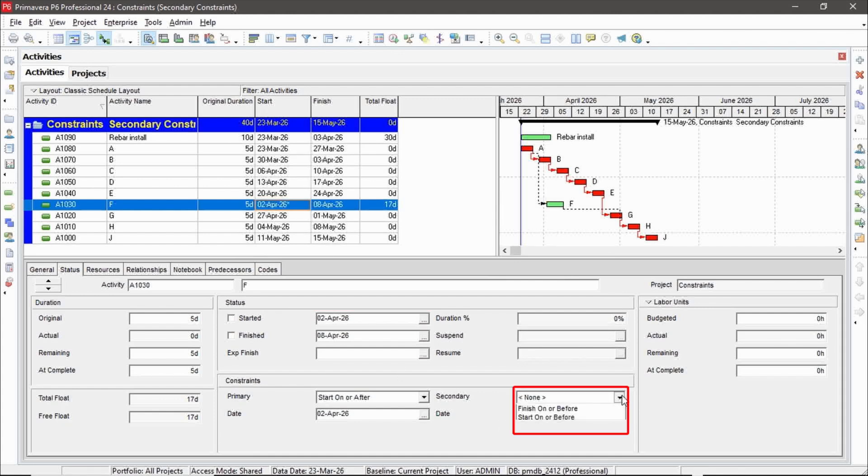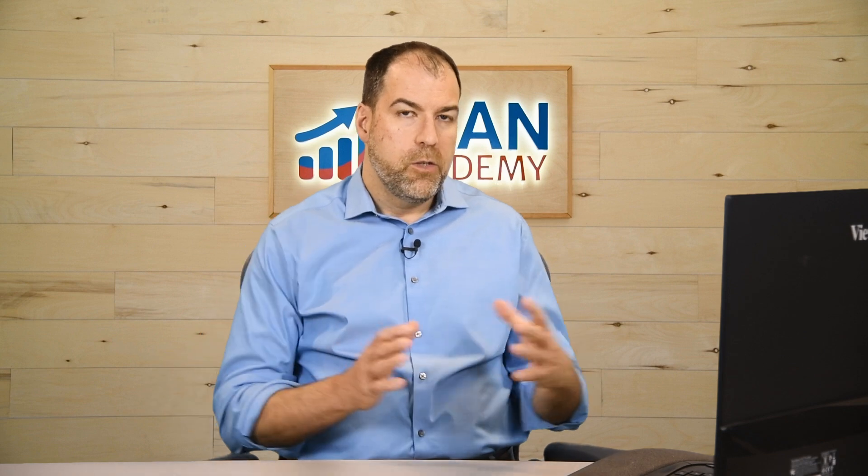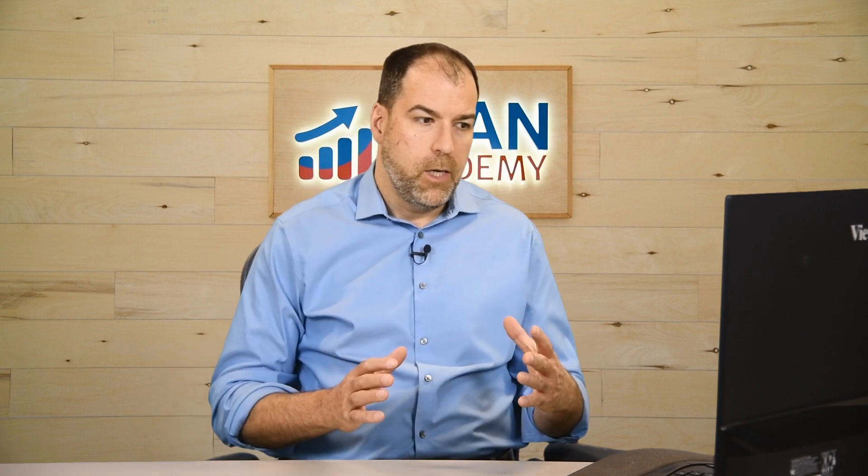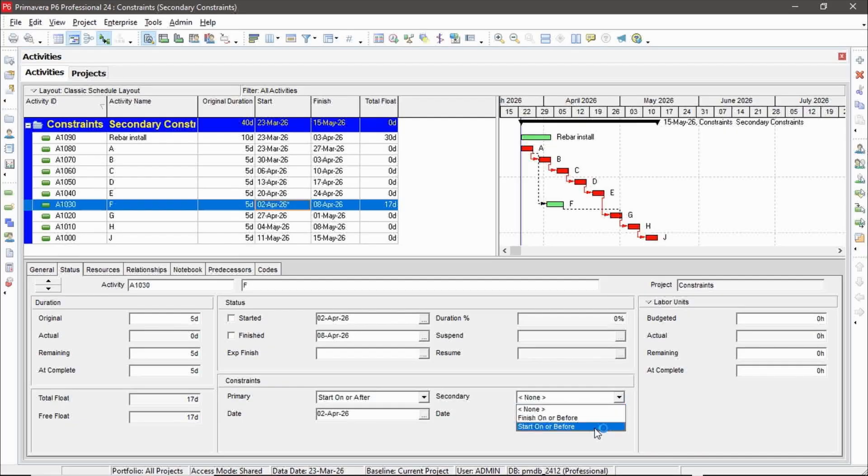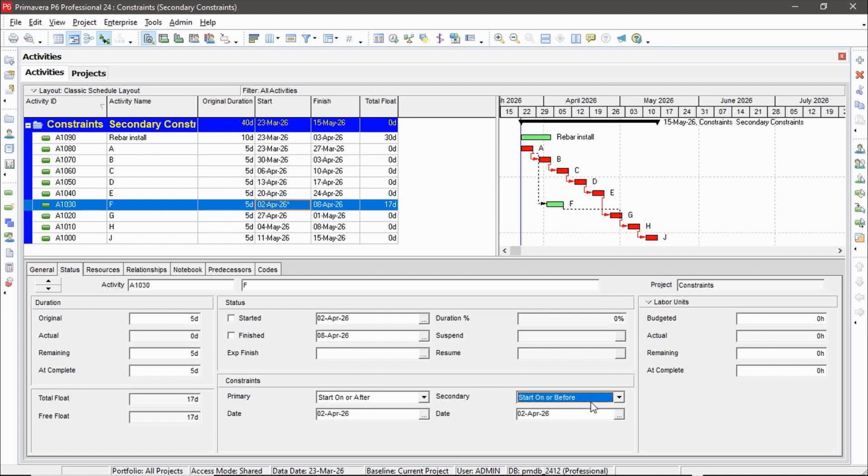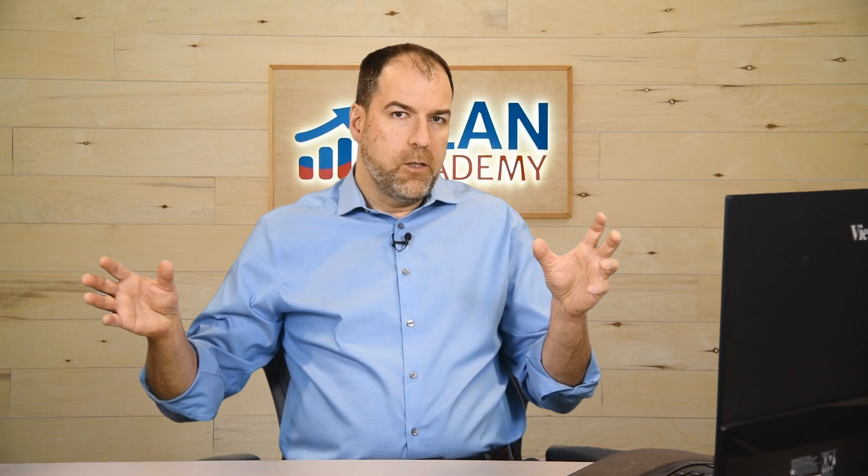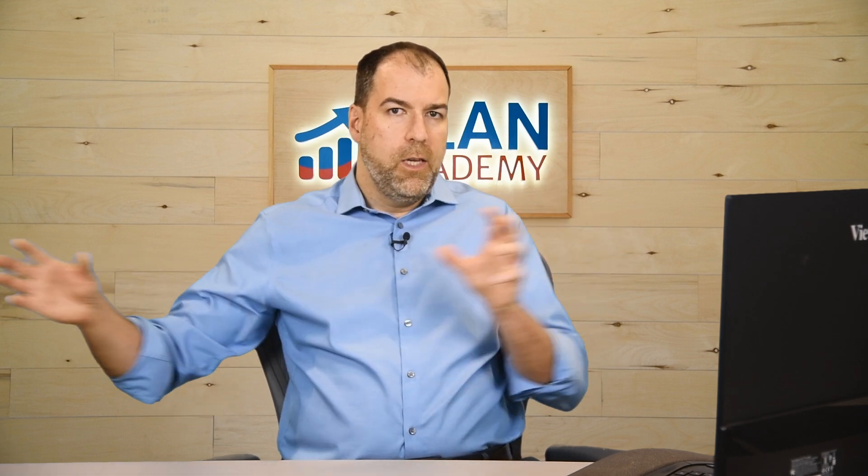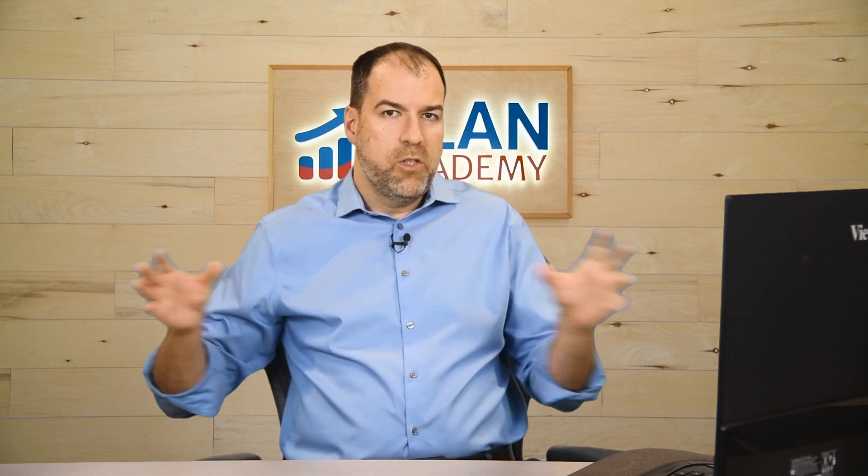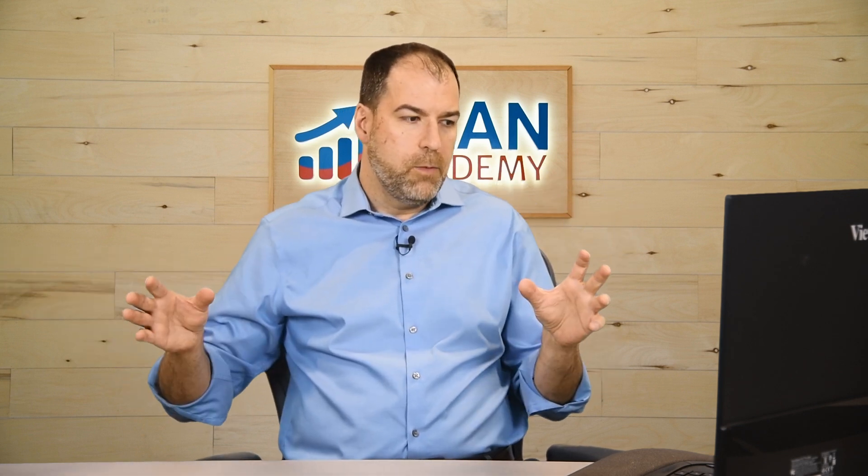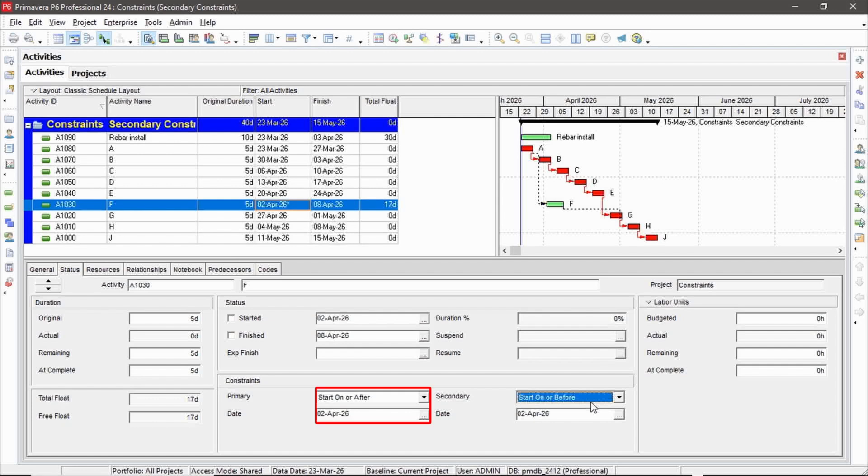Now in the secondary drop down, I have two options. I can apply a finish constraint to constrain where the finish will be or I can further constrain the start date. And let's look at that option first. So if I further constrain the start date, I can say start on or before. So I can set a range for my start date.